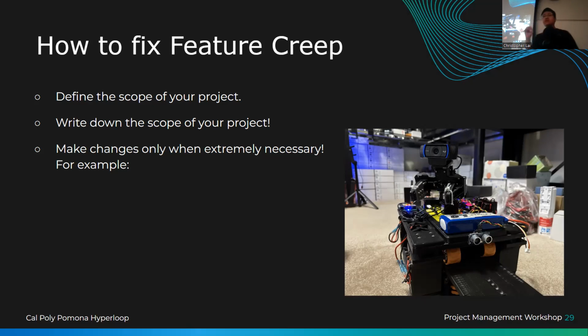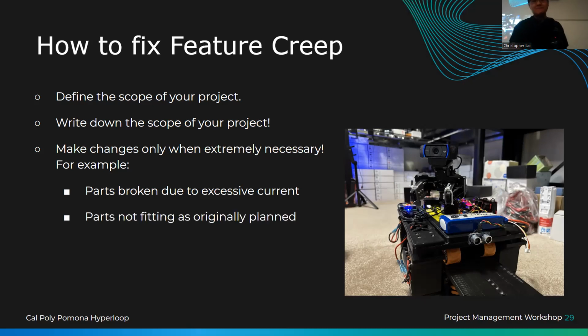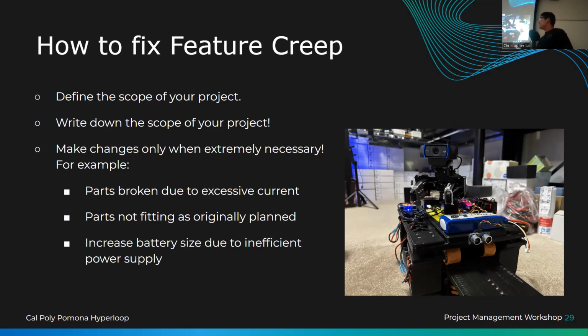Because necessary changes could include things like parts broken due to excessive current, which actually happened to this car. I exploded 2 motor drivers and 1 ESC before I figured out the power situation. Parts not fitting as originally planned. Then you have to come up with plan B, right, in order to make something that fits. Or you have to increase the battery size due to insufficient power supply, right?